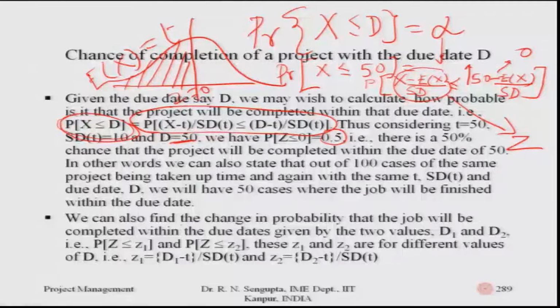Consider this: you are the vendor, and again coming back to the laying of the road from the city of Bhopal to Indore, the overall average time decided, the due date, is 3 months. If it exceeds the 3 months but is less than, say for example, 4 months, you pay a penalty of, consider, 2 lakhs per day. Now, after the 4 months your penalty increases to 5 lakhs per day.